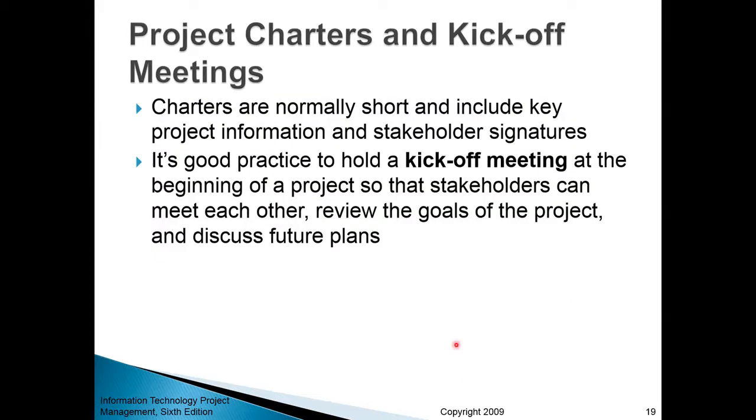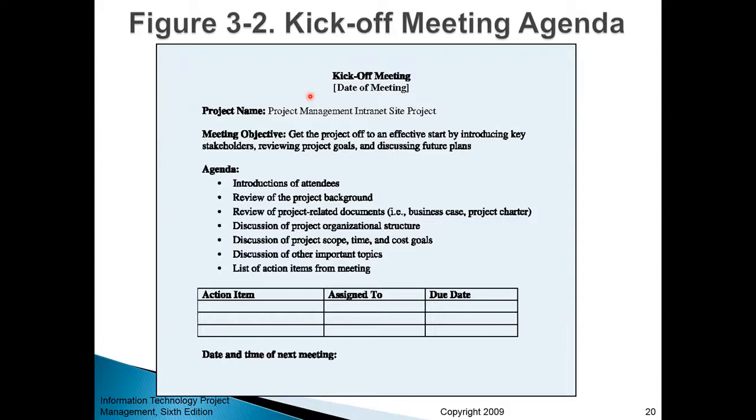It's also considered to be a good practice to have the so-called kickoff meeting during the initiation stage. This is where everybody gets together and signs the project charter and overall starts to talk about how they're going to proceed with this project. So here we have an example of a kickoff meeting agenda document, something that should be distributed to all the relevant stakeholders prior to the kickoff meeting itself. So I suggest you pause here for a minute and read all those sections and agenda items of a kickoff meeting document.